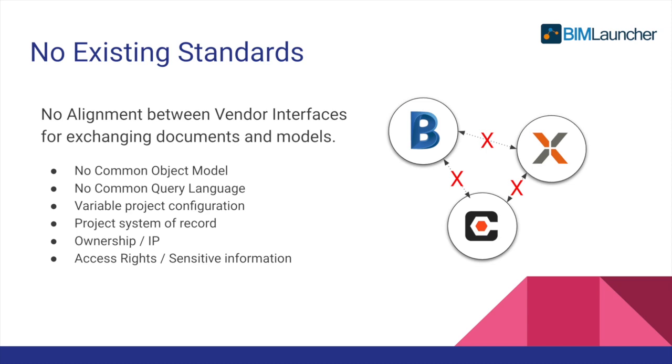In Procore, you have 2: your name and your description. So when you're moving documents from Aconex into Procore, you need to map or get rid of this valuable metadata. That just highlights one of the challenges when moving these different entities between systems.